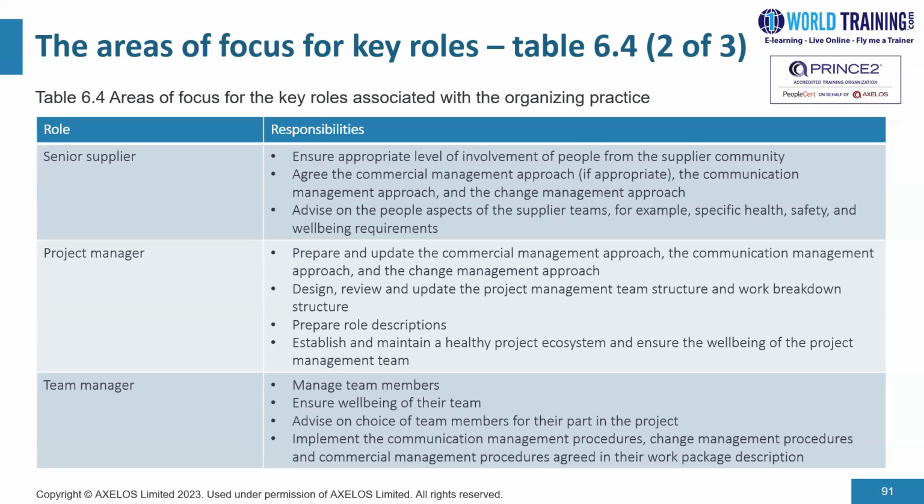Now, the team manager would manage team members, ensure the well-being of the team, and advise on the choice of team members for their part in the project. The team manager would implement the comms management procedures, change management procedures, and the commercial management procedures agreed in their work package description.